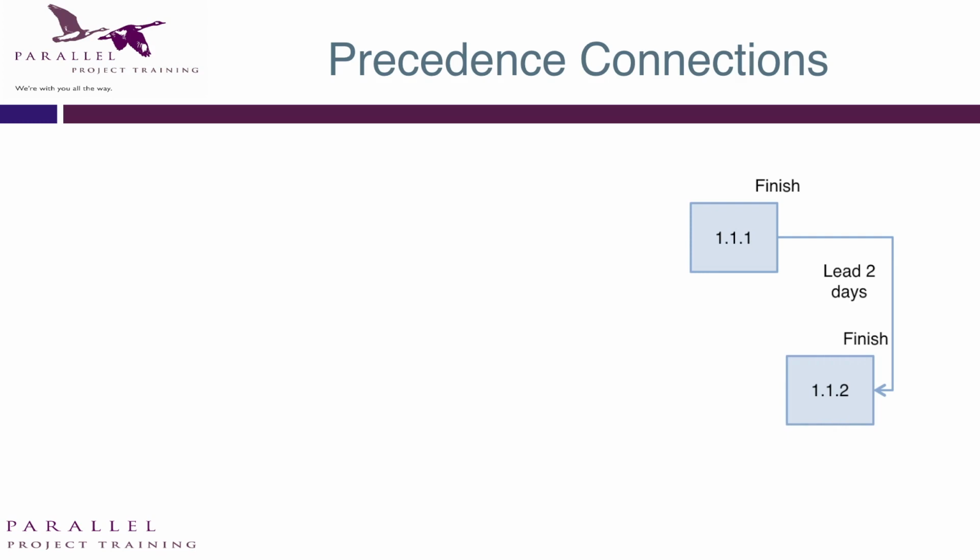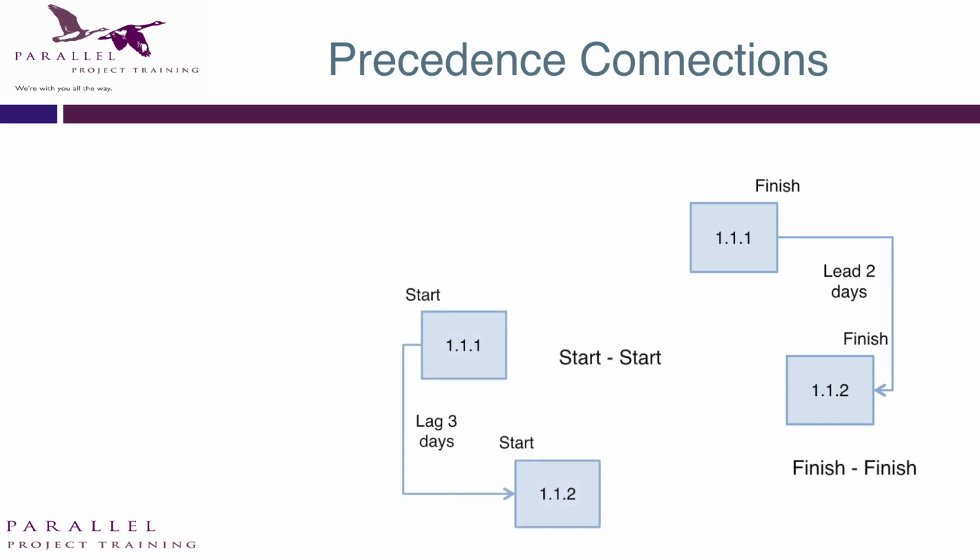So when is this used? This is often used for quality assurance or safety case or design files. So when do we start the design record? At the beginning of the design phase. When do we finish it? Well, it can only be closed out when all the design documentation is completed. So if the design takes longer, then that assurance role will take longer.